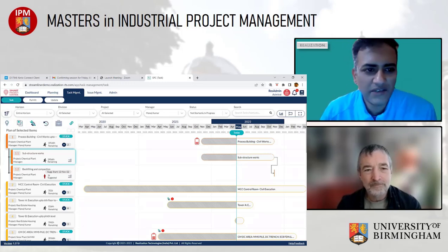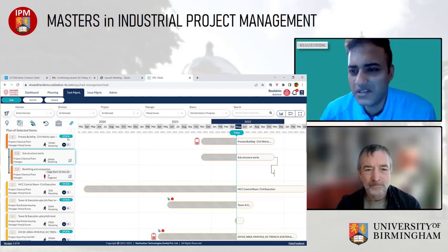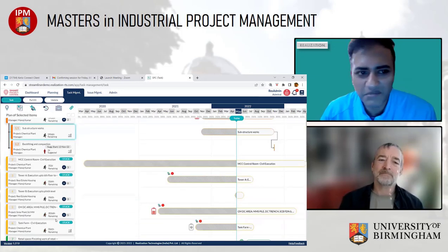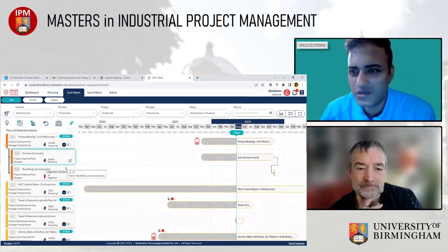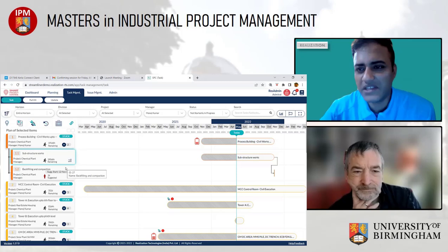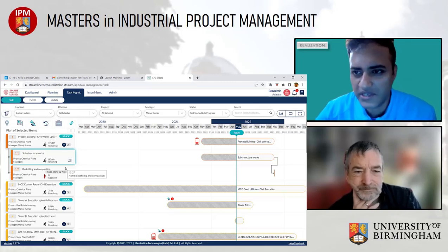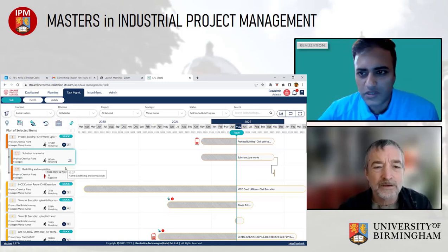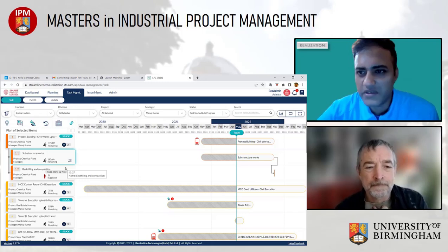Similarly, if you want to see the top task, it's showing it's stuck. So it gives you immediate feedback that this is the most important task in your portfolio. It is stuck. It should not be. This one should be moving. You can have stucks in green, that is fine. But your top priority task should not be stuck. So it's a feedback whether you are being able to follow focus and finish or not. So at every level, you have the option of taking actions in your sphere of influence.